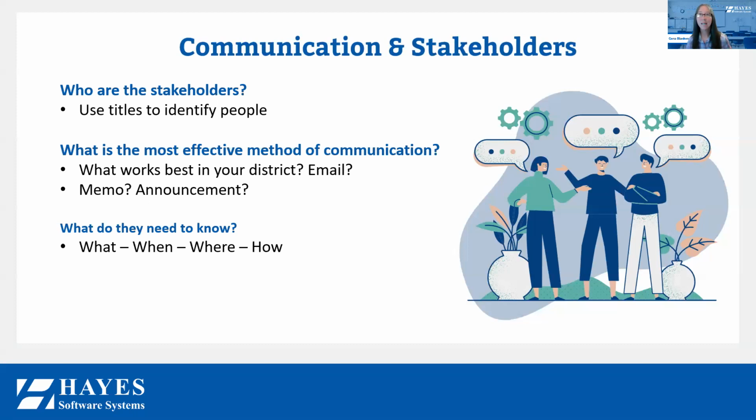So the night before an audit in a site, right before the teachers are dismissed, it might be worth an effort to have the principal make an announcement, a reminder: hey teachers, we're having our audit tomorrow. Don't forget to bring in any items that were issued to you from your home. Make sure they're here on site. And of course, prior to that announcement, we've sent emails out with the same kind of reminders. So we're going to disseminate the same information over and over again, just to make sure that everyone gets into the loop.